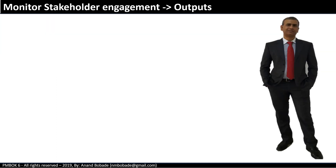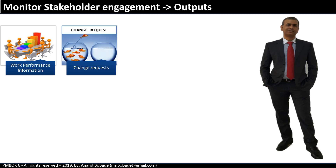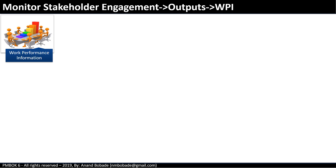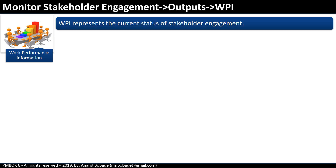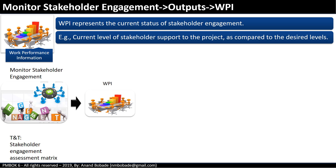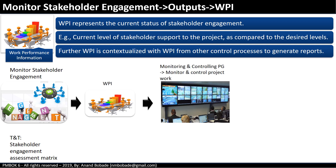The outputs are: work performance information, change requests, project management plan updates, and project document updates. Work performance information (WPI) represents the current status of stakeholder engagement. WPI is generated when tools and techniques such as the stakeholder engagement assessment matrix are used — it tells you the level of stakeholders' support compared to the desired level. WPI is also contextualized with information from other control processes to generate reports.